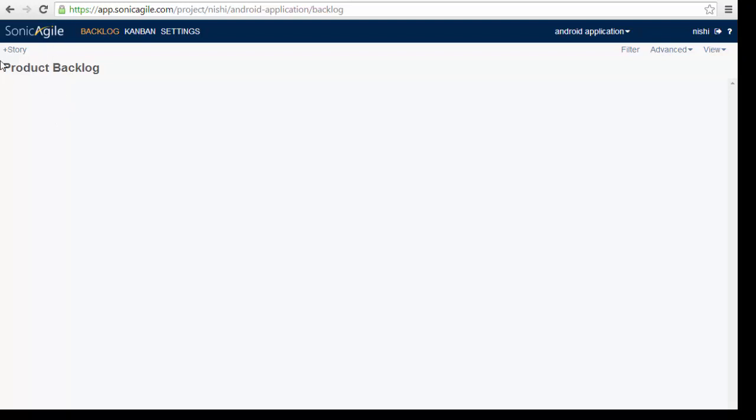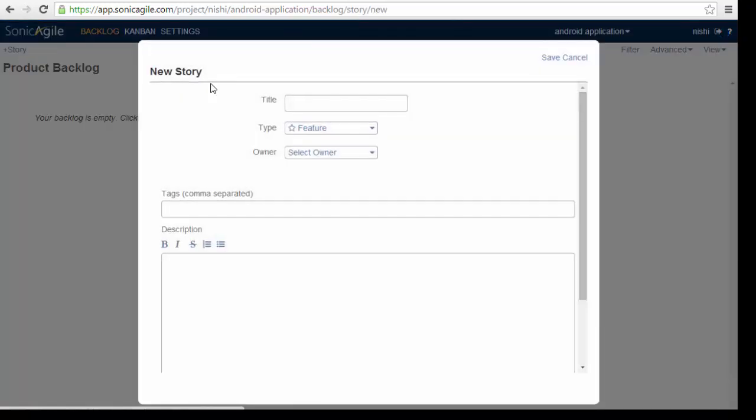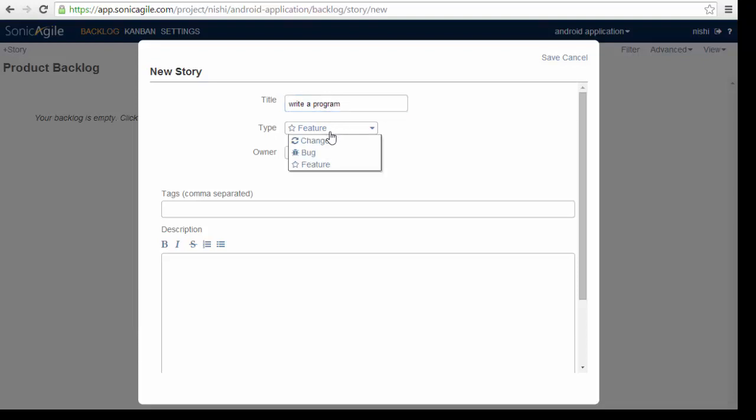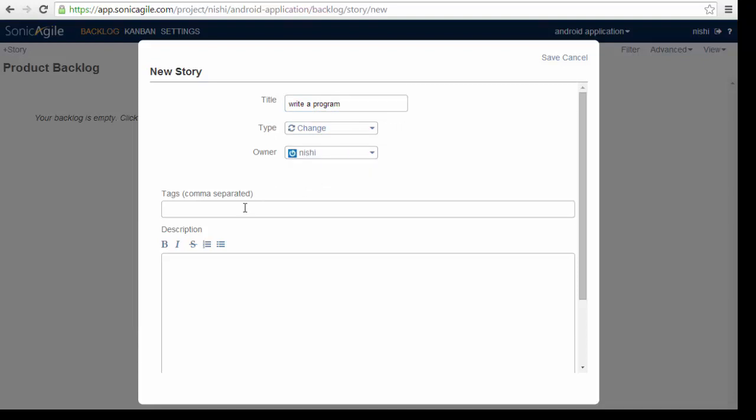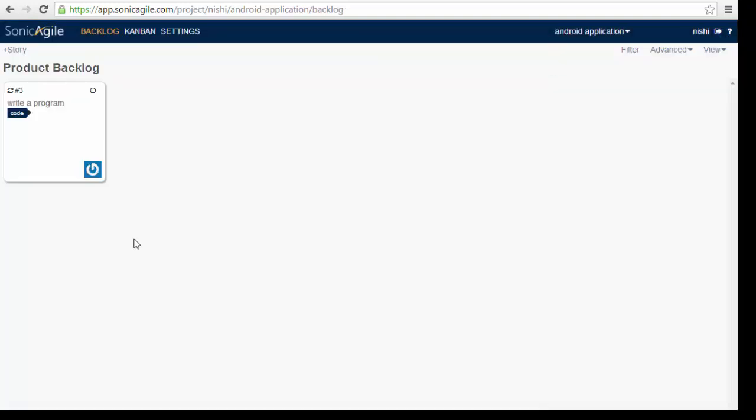To create a new story, we must enter the title and story type. For example, if I add a story, write a program, I need to enter its type. I am using change, its owner, I can assign anyone which is in the member list. And then I need to add some tag, for example, if I need code. This is how you create your story.